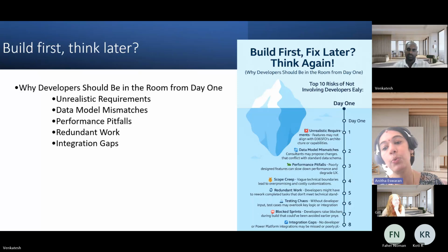And also, how do we do the data upgrade? How do you bring the data to FNO? At times, because the source system is different, it will have a different data model. So how do you map this data model to FNO? We then need to plan using the DMF templates, because you have templates where you can import the data. How do you prepare the data like this? How do you set up the system? All these discussions would give you a better idea of how to plan and start this new implementation.